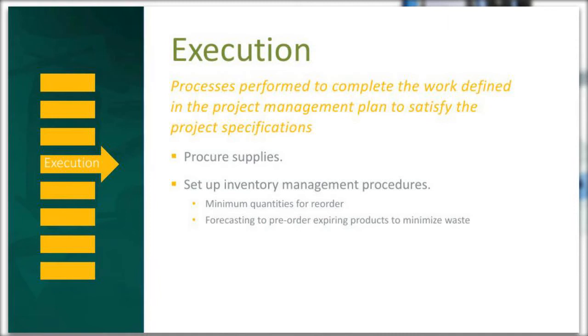We found that special orders, especially in things like sodium chloride, where it's the 250 ml or the 500 ml bag, are really getting hard to come by. And they've really delayed a lot of studies because they waited so long to order.